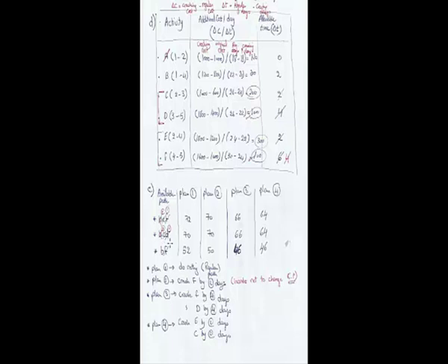Then we're going to look at ACD. We have here C and D, and we're going to ignore A as we have said before. For C, the additional cost per day is 200, and for D, the additional cost per day is 100, so D is less. The available days here are 4, so it is more convenient for us to use D, because the days are equal to F. Secondly, it is also lower in cost.